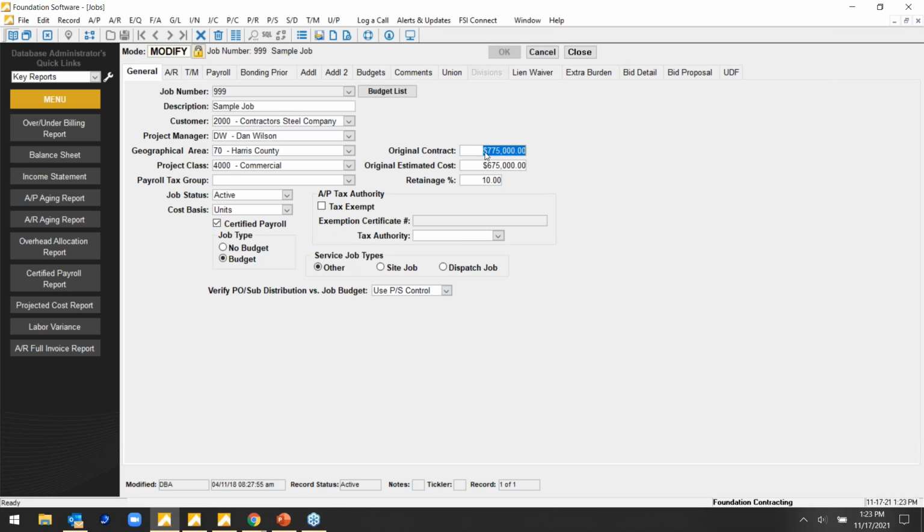To the right of all that, contract amount, estimated cost. If there's retention, that percentage can be defined on the job, and the system would know what to hang on to. Always a struggle with the generic software of the world like QuickBooks. So for retention, as an example, if somebody creates a billing in our system and it hangs on to that 10%, it will keep it separate.